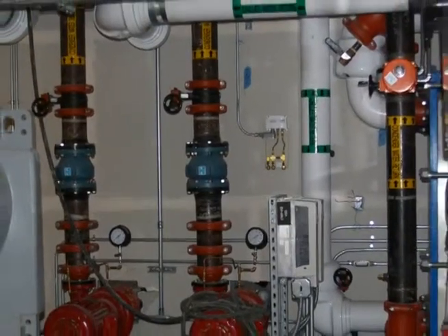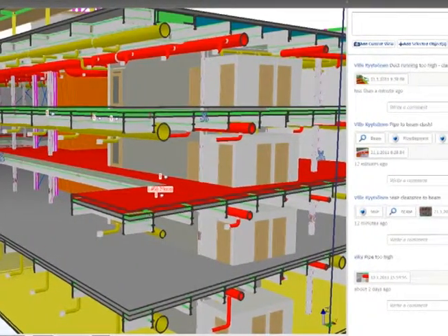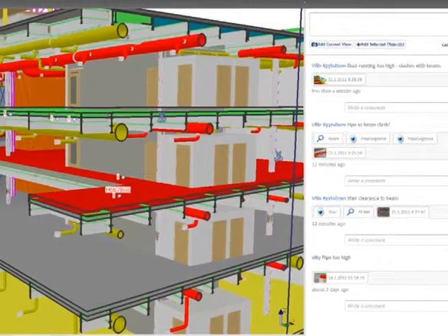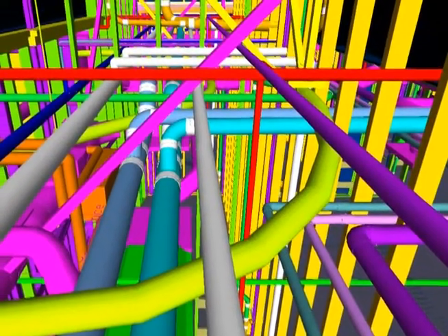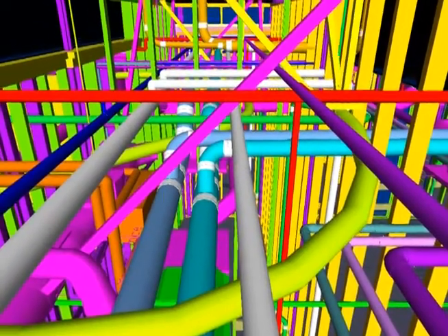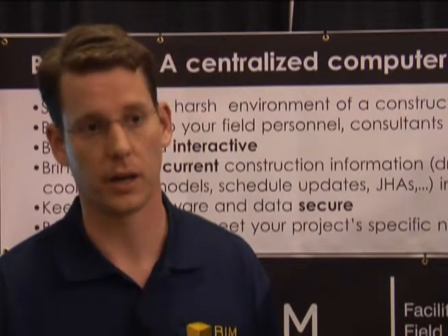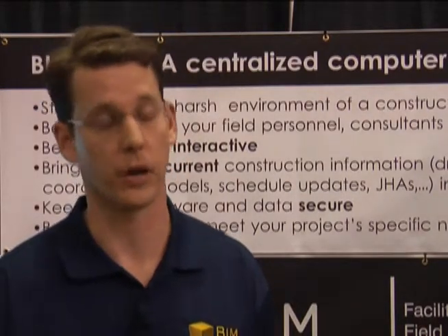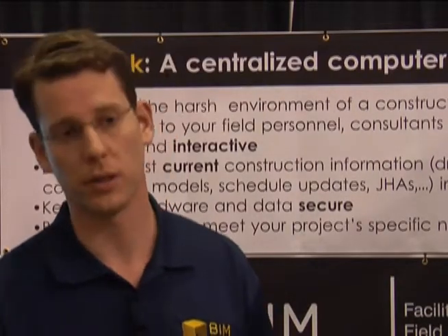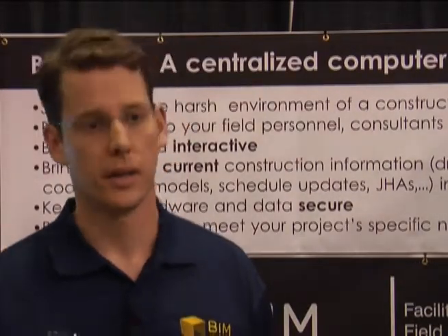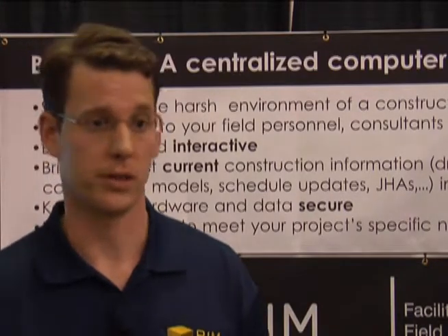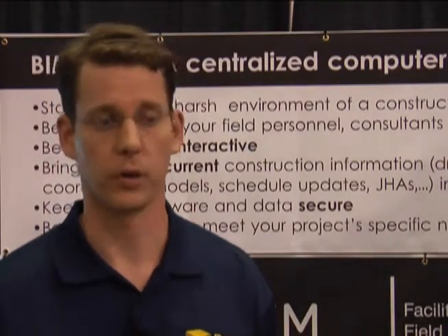And the most cost-effective way to use building information modeling currently is just for simple 3D collision detection and coordination. You can also find a lot of constructability issues by putting an architectural, a structural model in together with your mechanical, electrical, plumbing, and fire sprinkler models, and just finding issues that don't pop out to you in a 2D overlay. The old-fashioned way of light tables, it doesn't find a lot of issues that these 3D models make very apparent. And each time you miss a clash like that and it gets out into the field, it ends up costing far more than it would if you had invested the time up front to do better planning and better coordination, and this 3D model presents that better coordination method.